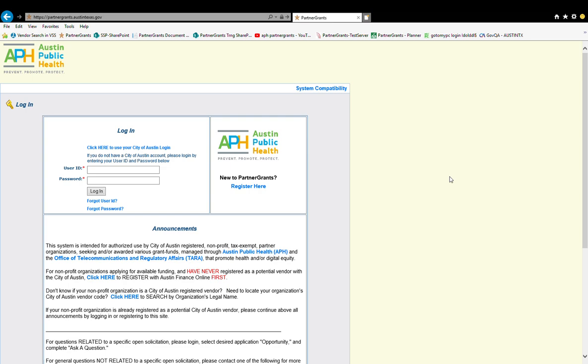Once you are ready to continue, essentially, if your organization's signed contract end date has elapsed and the terms of your agreement have been fulfilled, select Contract Closeout. If your signed contract end has not elapsed and the terms of your agreement continue on, select Contract Progress.